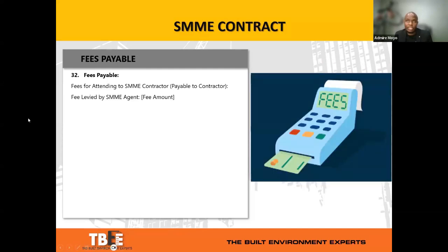So I think in closing, just going to the issue of fees payable. At the end of the contract, there's a schedule that allows for fees to be levied for attending to SMME contractors, and this is a fee that's payable to the contractor, and then there's a fee that can be levied by the SMME agent. The schedule also allows you to enter a fee amount that's payable to the SMME agent as part of administering the SMME agreement.